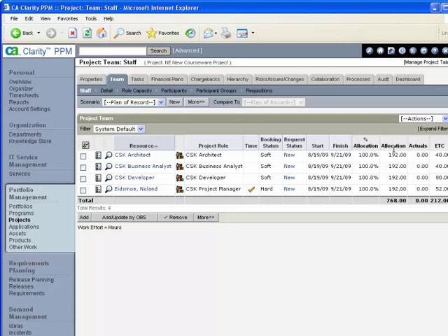The next one on here is right next to it, actuals. Those are actual hours by resource. Only named resources that are open for time entry can charge to the project. In order to have actuals on the project, you have to be allocated to the project. It's your only access to get it onto your timesheet. And then through the normal timesheet process, actuals, of course, will only show up on here once the timesheet has been submitted, approved, and gone through the posting process.